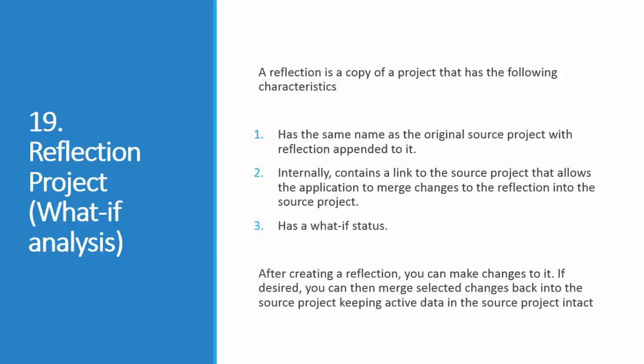Reflection project. This is also called as what if analysis. After creating the schedule, we can reflect the schedule. Means reflection is nothing but a copy of a project. Rather than experimenting on the main schedule, spoiling the project schedule, we reflect it so as to experiment, like if I change this date and if I put a specific constraint on a specific activity, what will be happening. That's why it will be called as what if analysis.